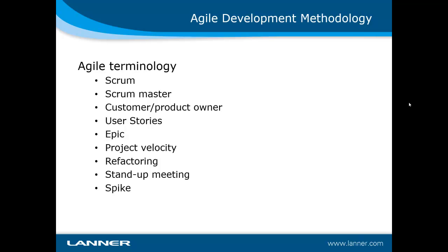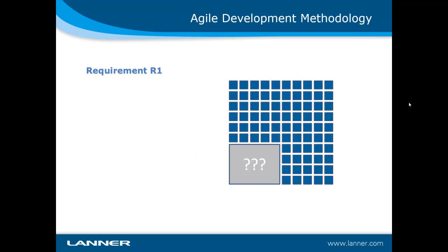Okay, a spike is a similar concept to a sprint, so it's a period of work in which we carry out changes to the development of the solution. I've got a slide here to describe a bit more about what a spike is. Now, if we don't understand very clearly the requirement, and we can't articulate that requirement very clearly, or we know what the requirement is, but we don't know the best way to go about designing the solution to that requirement, then we have a bit of a black hole in our requirements or our design. And a spike is a period of time in which we do some exploratory work, normally looking at a few different options of ways to articulate the requirement or ways to develop a solution to a requirement which is maybe slightly more unknown than the rest of the backlog.